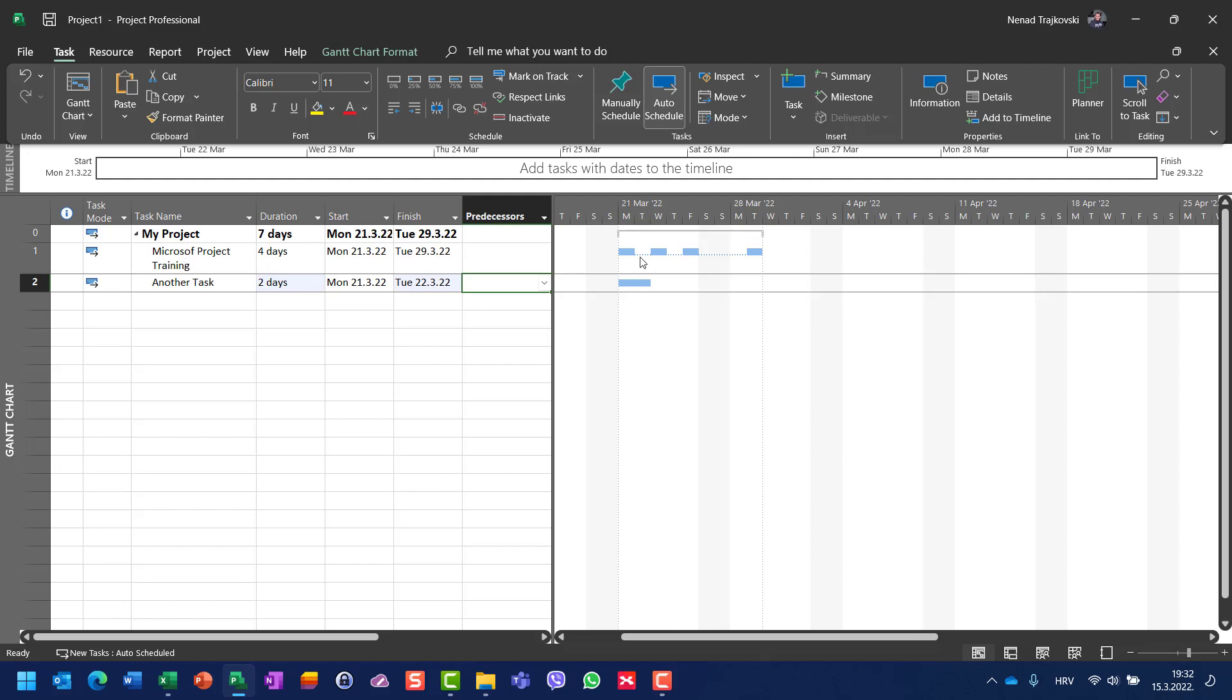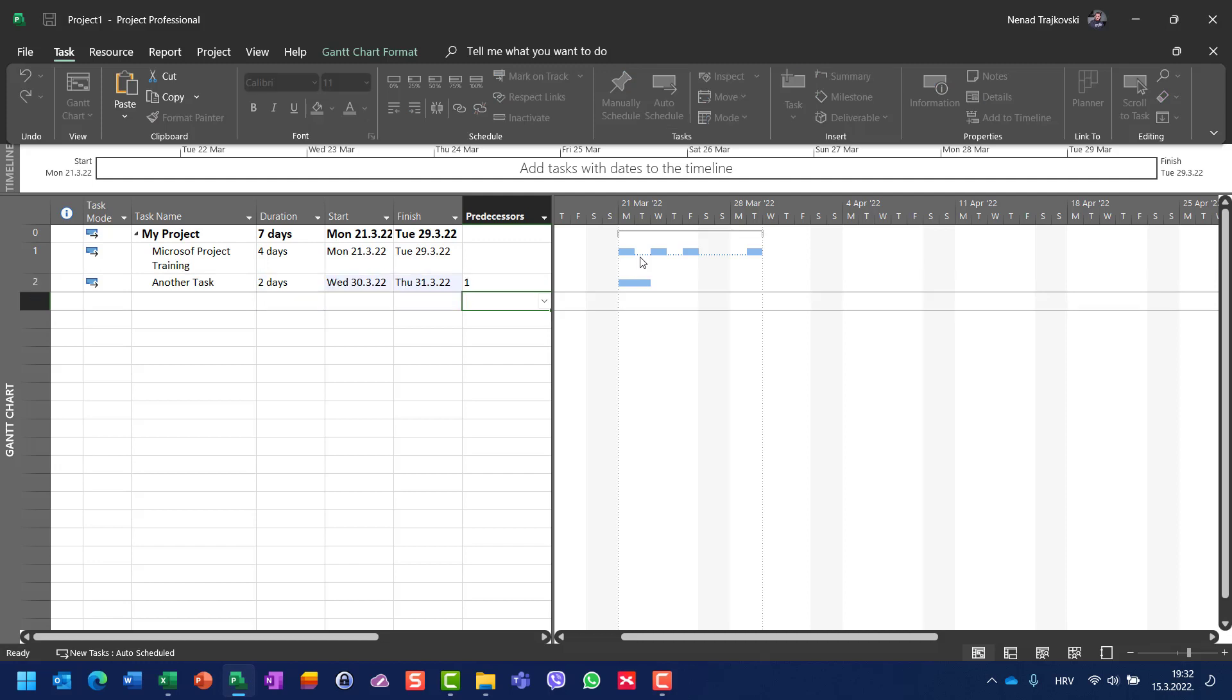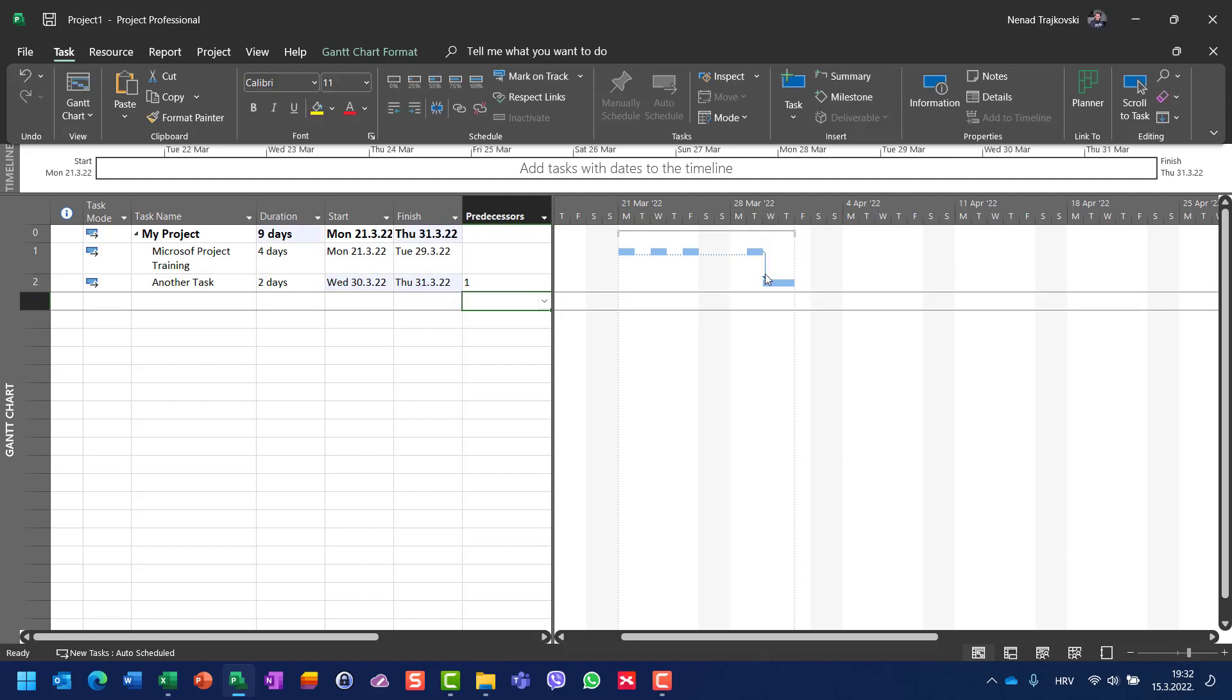So let's say that I hit task one. The predecessor will be finish-to-start, of course, at the end of the whole task. So there's no possibility to make a part of a task as a predecessor.